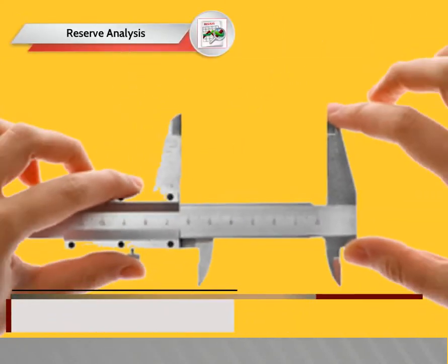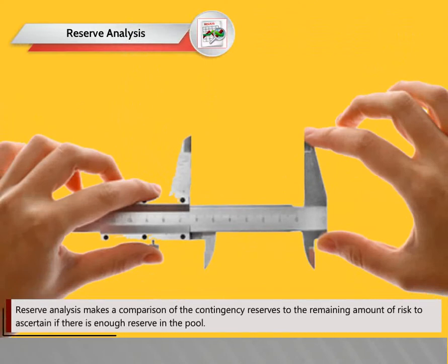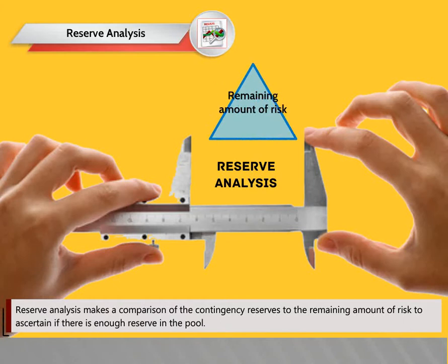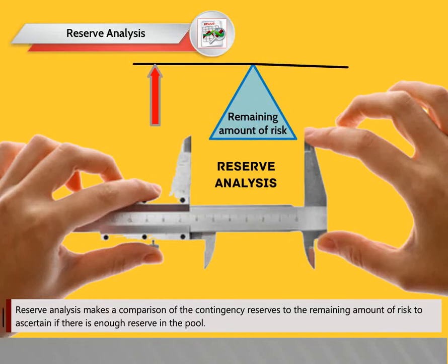Reserve analysis. Reserve analysis makes a comparison of the contingency reserves to the remaining amount of risk to ascertain if there is enough reserve in the pool.